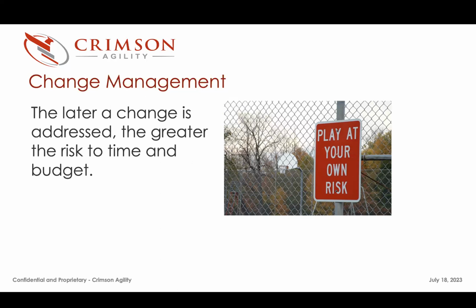The hardest change to manage and hold the client accountable for is change that is brought to their attention at the end of the project, when you realize you're out of time, when you realize you weren't able to absorb it, and you're now scrambling to get a change request so that we can get the project completed. So this is why you don't let it linger or go unaddressed, and save it till the end, because you lose credibility when you're running out of time and money and now you're asking for more. You have a lot of credibility if you can address it in the design and planning phase of the project in those first 2 or 3 weeks.